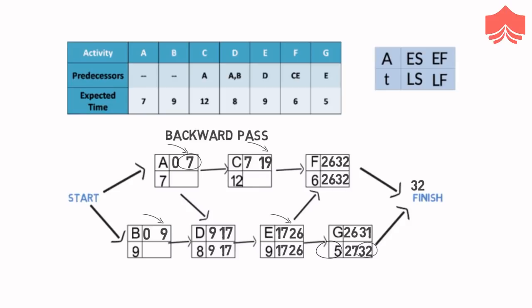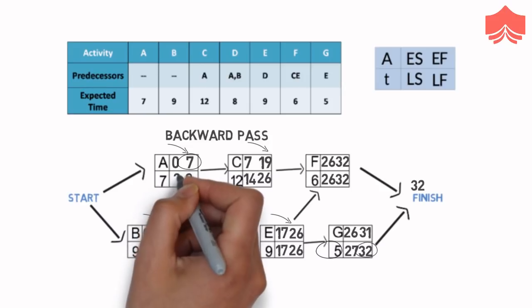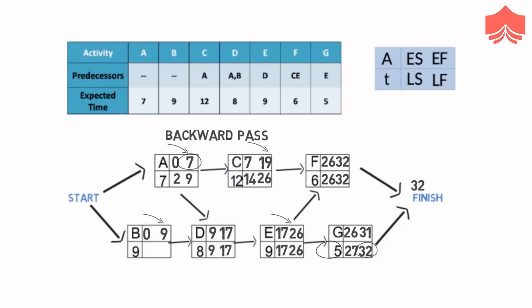Similarly, C has only F as its successor. Therefore, the latest finish time for C is 26, and the latest start time would be 26 minus 12 equals 14. Now A has C and D as its successors, and the minimum of their latest start is 9. Therefore A's latest finish will also be 9, and its latest start will be 9 minus 7 equals 2. Similarly, B has D as its successor with the latest start of 9, which becomes B's latest finish, and therefore B's latest start becomes 0. Here finishes our backward pass.